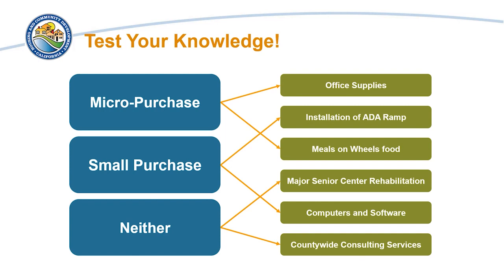Here are the answers. The purchase of office supplies can be procured using the micropurchase method so long as the supplies do not exceed $10,000 in the aggregate. The same is true for food for a Meals on Wheels program. The purchase of multiple computers and software will likely require the small purchase method since the purchase is likely to exceed the micropurchase threshold of $10,000 in the aggregate but not exceed the simplified acquisition threshold of $250,000 in the aggregate. Likewise, the selection of a contractor to install a new ADA ramp expected to cost less than $250,000 may be procured using the small purchase method.